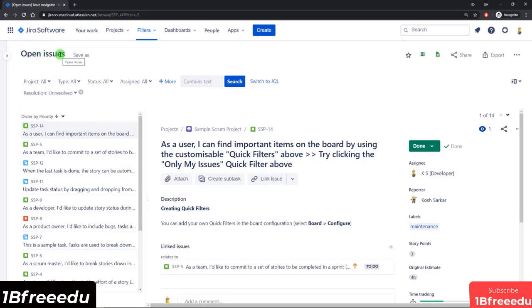then according to Jira, the issue isn't resolved and is still open. So sometimes people may set a status to done and they move it to that status, but they don't have any configuration to set that resolution field. So then when they go to use one of the built-in Jira reports, let's say the created issues versus resolved issues report, and then they wonder why the data is skewed, well, because the resolution field wasn't set.